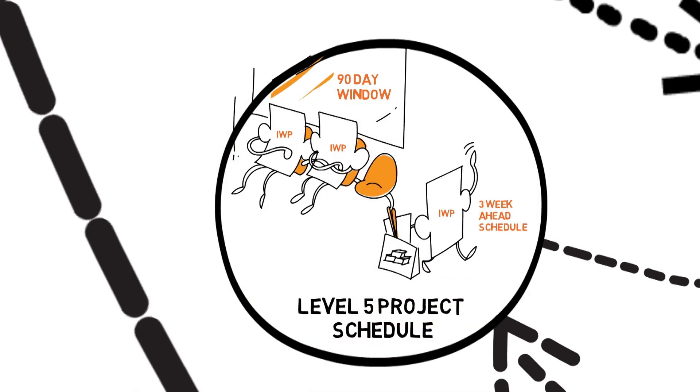The sequence of activities in the schedule are then linked to the IWPs in the 3D model and played out as a 4D simulation of construction.